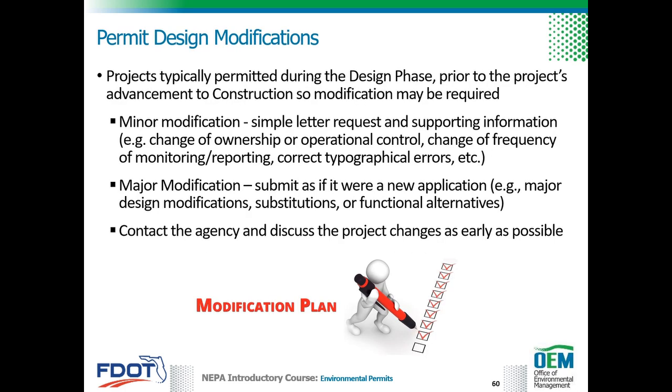Many FDOT projects are permitted during the design phase prior to the project's advancement to construction. When changes to the project design are proposed after permitting has already been completed, modifications of issued permits can be processed with the regulatory agencies to authorize the required changes.